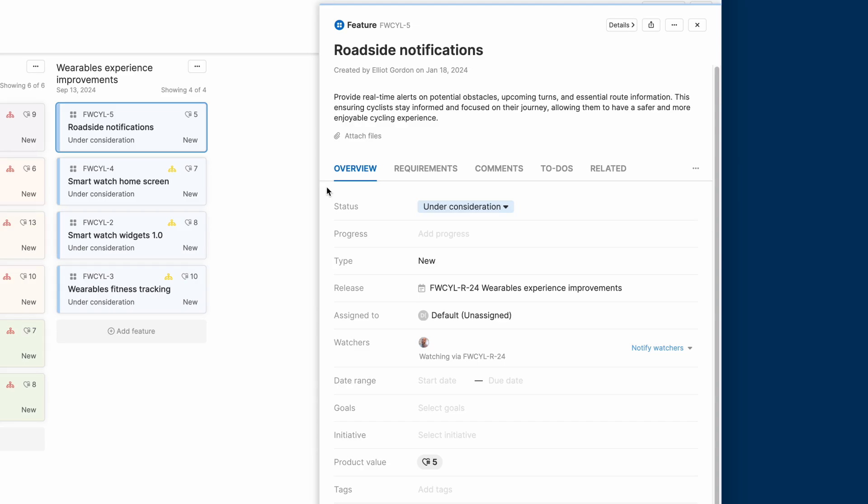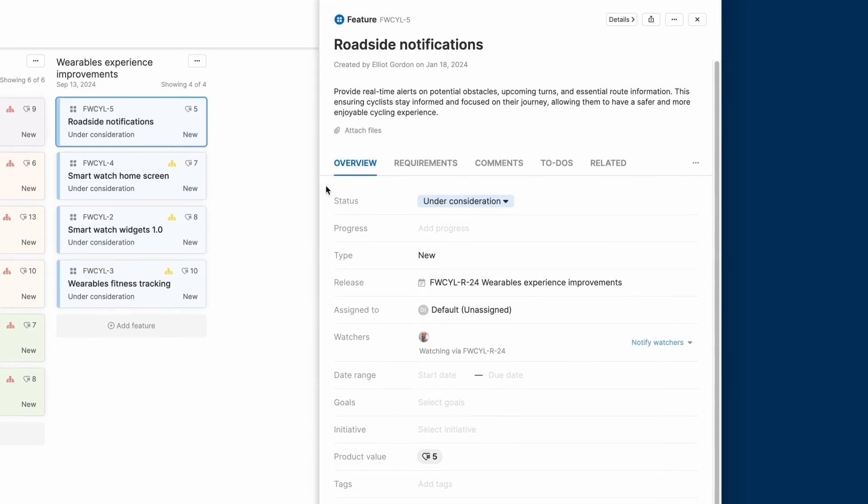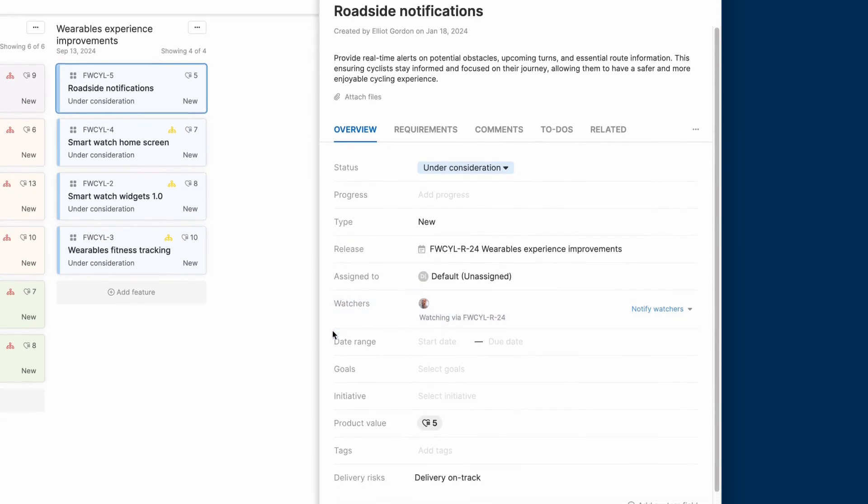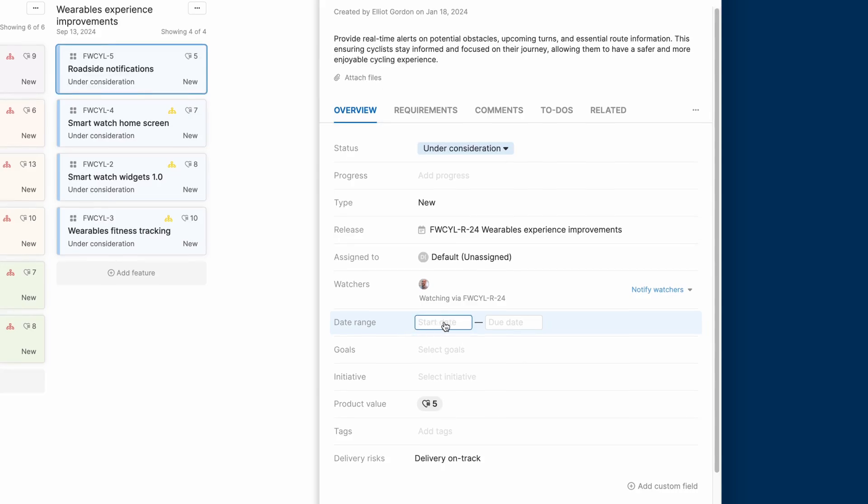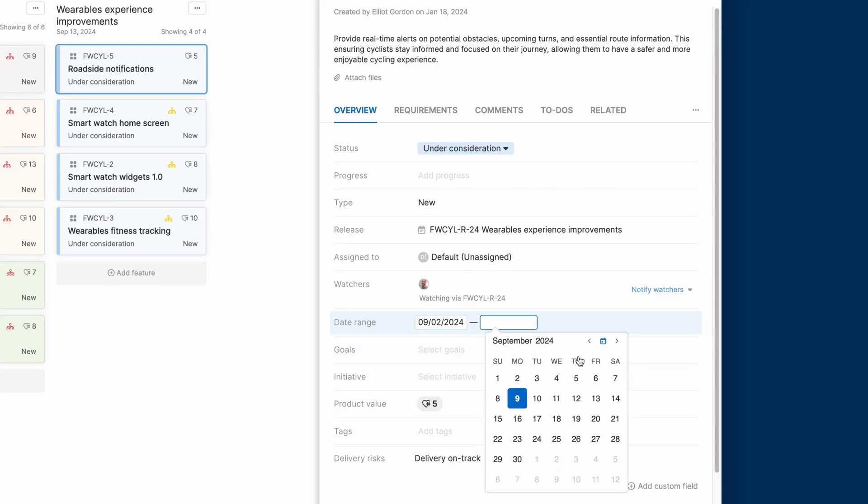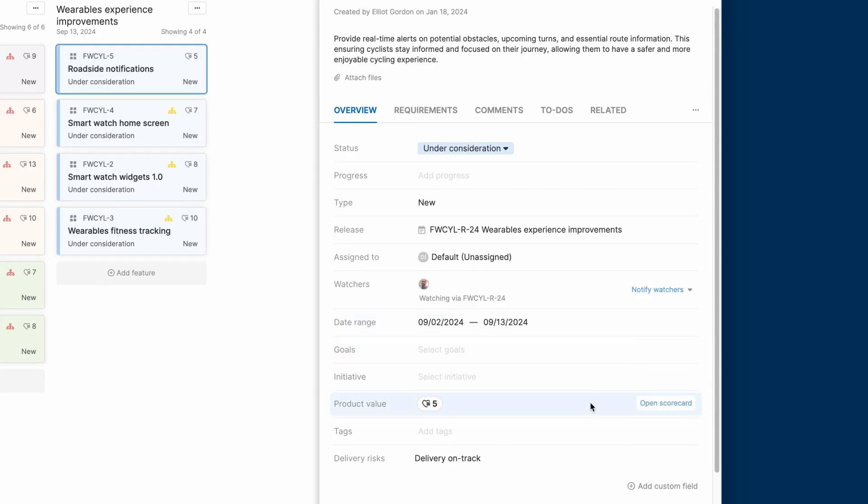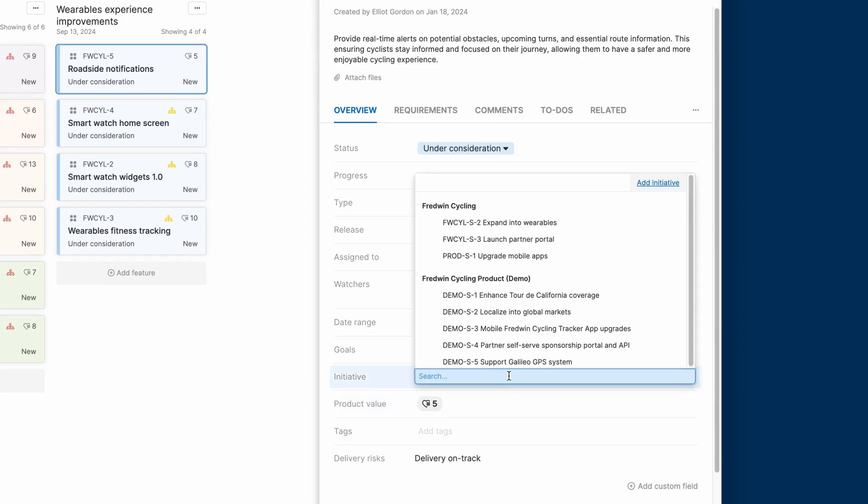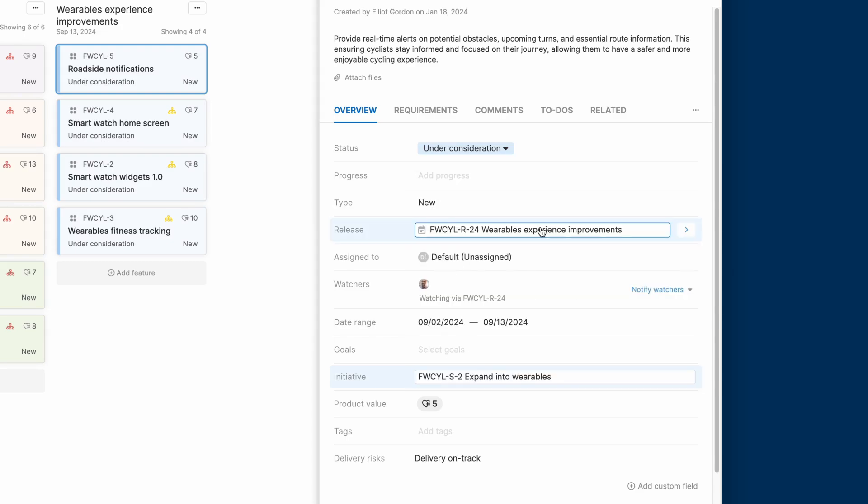But for the purposes of building our roadmap, the key fields to fill in are this date range. You can always adjust the start date and due date later as needed. And then you'll want to make sure that each feature links back to one of your product initiatives. This is essential for building your roadmap.